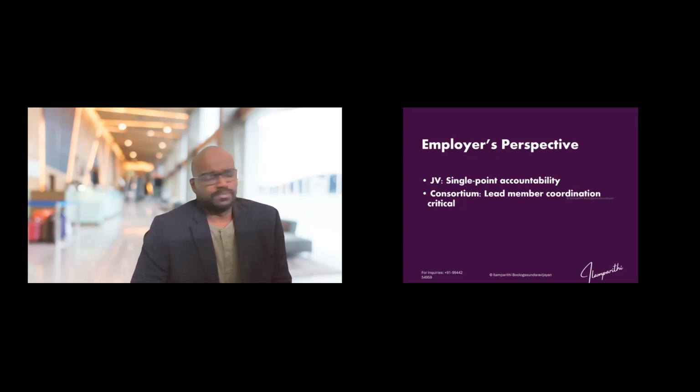From the employer's perspective, what is a JV? It is single point accountability. You can treat the JV as a single point of accountability for anything in the contract. When it comes to a consortium, even though the lead member is coordinating and critical for the coordination, it will be a bit difficult because you can feel the identity difference between each party.